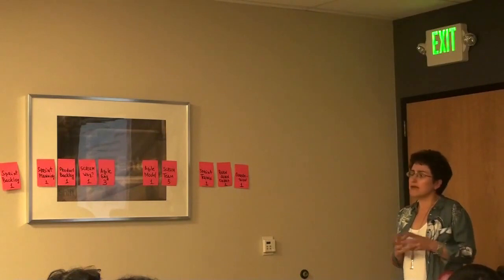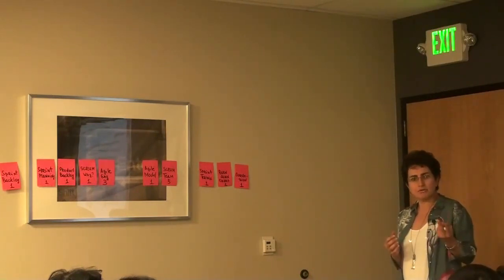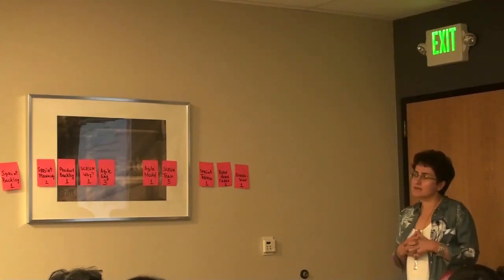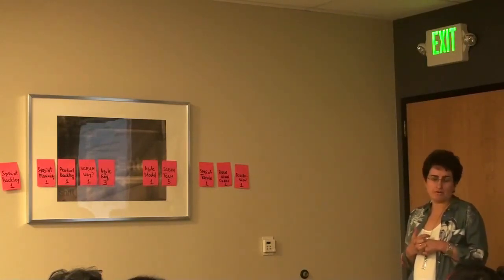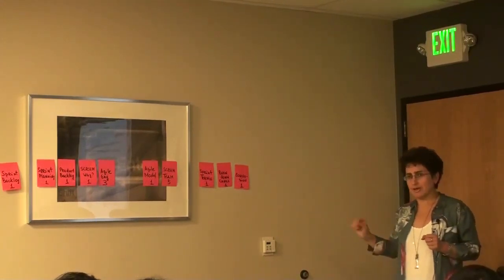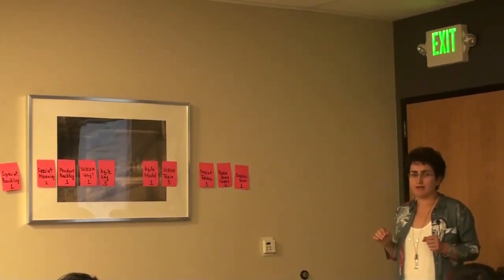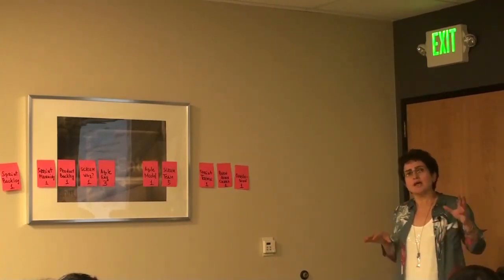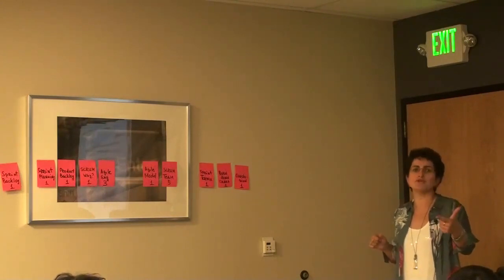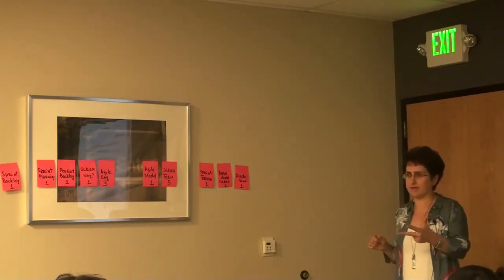And there are 2 main methodologies that people use in Scrum in Agile development. One is approximation. So what you can do, you can split all your features in buckets. For simplicity, you can bucketize your features as small features, medium features, and large features, right?